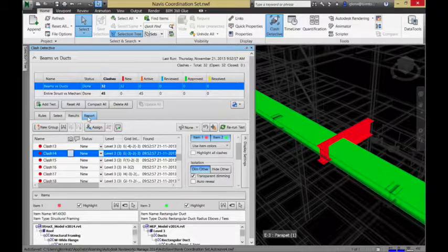But we can get all these clashes, we can produce those reports and give them to people. So I can get a report of everything that's been assigned to me. You can get a report of everything that's assigned to you. Then next week we're all going to get together, and with your updated model and my updated model, you're going to run the reanalysis. We're going to hopefully drive the number of clashes down, see if we resolve them all, and track them like a database. Okay, so that's the general idea of the workflow.